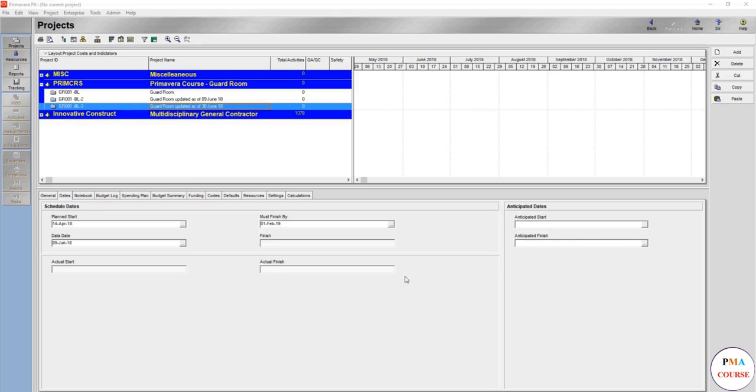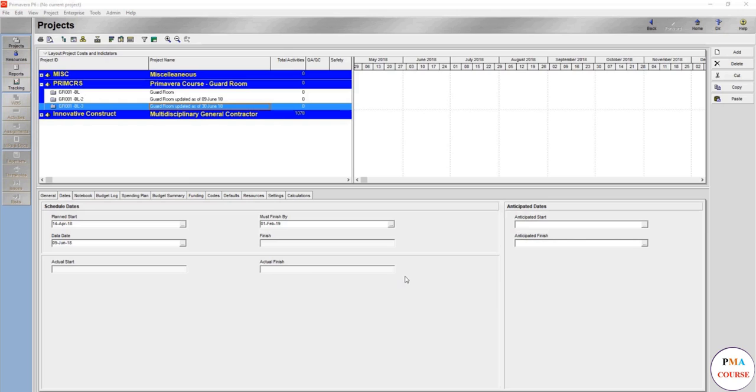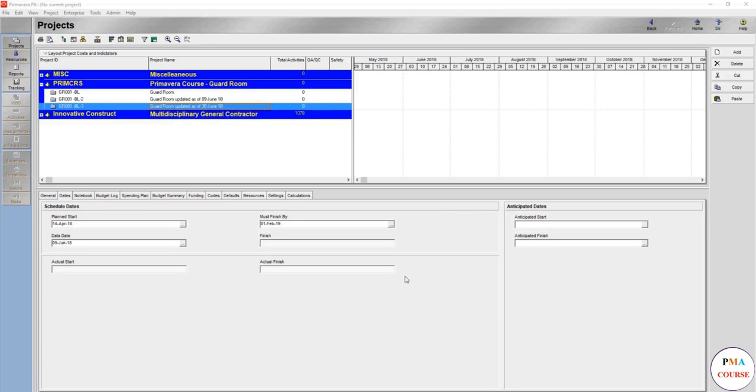But remember, because this might confuse a lot, extension of time is not just only preparing time impact analysis. What you are going to do here is only the time impact analysis, but you have all your documents you have to write and describe. You have to identify the cause, the effect, substantial documents. You have to have a lot of items just to prove your case. It's like going to the court and you have to prove your case.